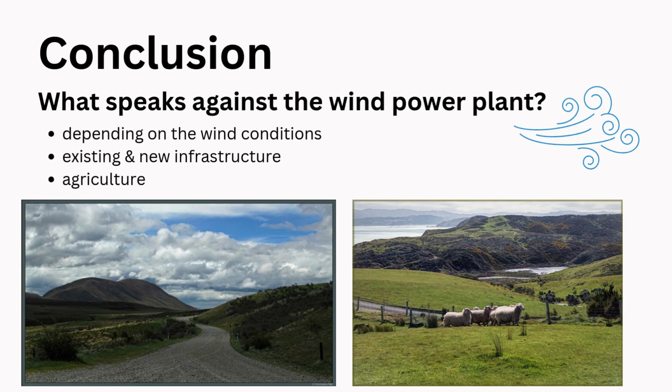You see on the left picture there are small streets, and on the streets it's difficult to transport big materials of the power plant, like huge rotor blades. Or new infrastructure must be built, and that means not only streets but also transmission lines for the electricity, and that causes extra costs.